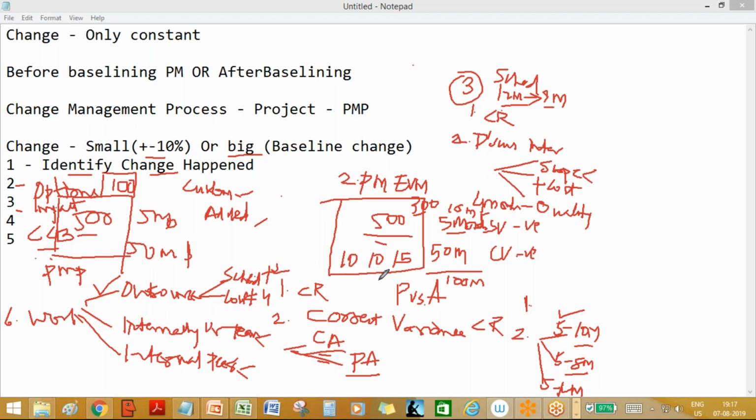That EVM has to go to the next step. First of all, you identified that 150 is the new cost estimate, correct? Yesterday we saw that, yeah, 150. The original was 100, now it's a new 150. That was the first option. That is a standard process performance, your team works like that. And you say, okay, 150 is what I want, and the sponsor and customer want to approve it. So what is the change process now?